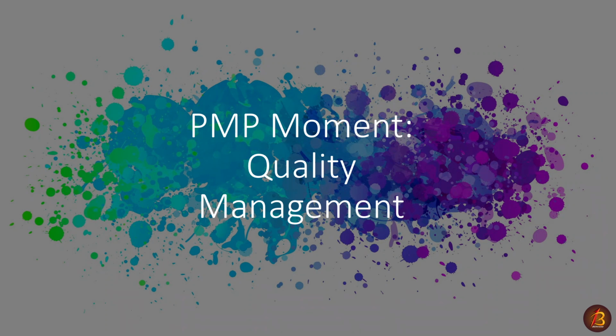And like in cost management, where they talk about the cost of risk, which is how much it's going to cost me to do risk management, you also have to look at the cost of quality. And part of the reason is that in software development, particularly, you tend to run into defects. So if you don't take the time to implement any kind of quality management protocols, standards, whatever, you'll have a higher likelihood of facing or finding defects in the software that your developers develop versus if you implement it. Now, that also doesn't mean, though, that you make those processes difficult or strenuous. You obviously have to tailor that to the needs of your program or project.